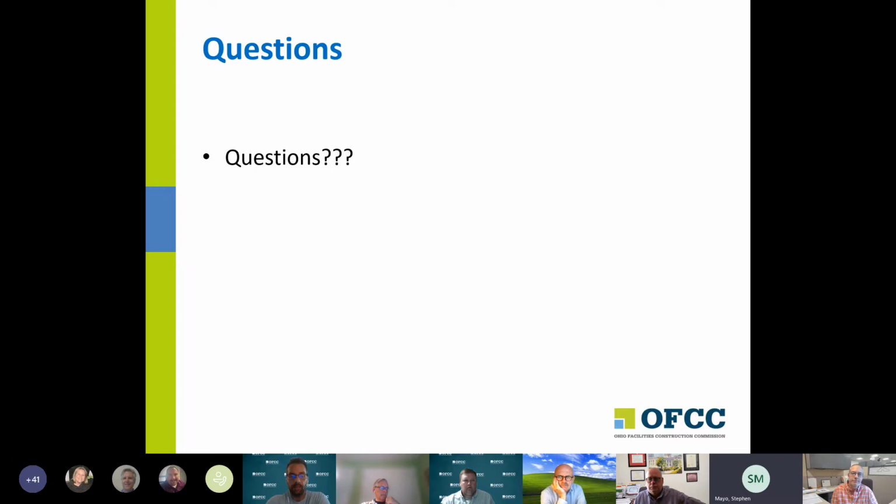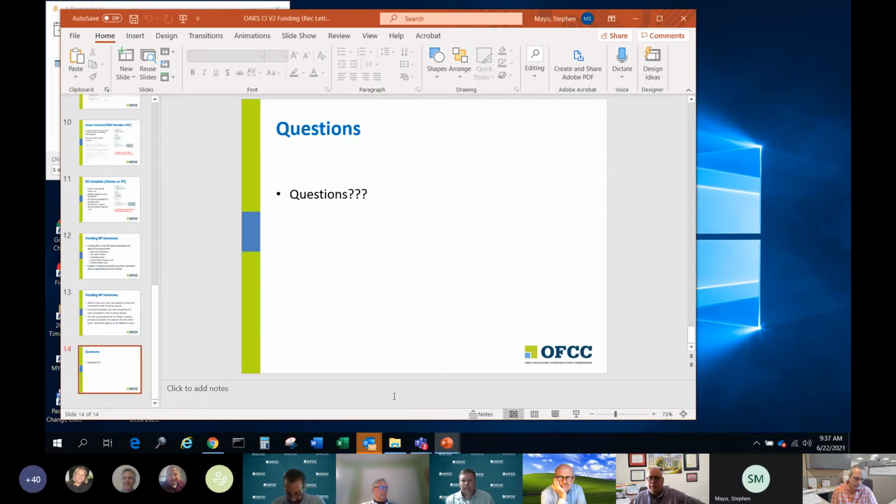Questions about anything we talked about? Steve, just to confirm, for every contract you're creating, you need to run the funding BP for that contract. I'll say it a little bit different. For every PO you need issued, you need to run the funding BP for that PO.